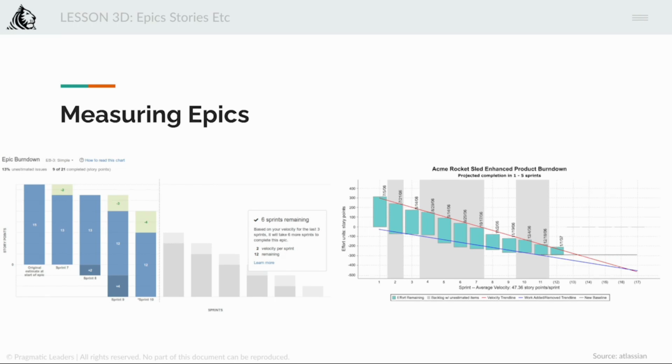Let's say forget about story points for the moment. Let's think of work in terms of hours, developer hours, right? Which is something which we understand a little better. So let's say the entire epic was worth 500 developer hours. Now one developer typically would invest about 200 developer hours per month, which basically means if there's only one guy, then this epic is going to take about 2.5 months. Correct? Because 500 work hours and 200 per month, so 2.5 months. If there are two people, it can be done within a month, a little over the month.